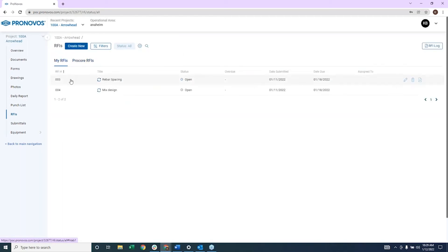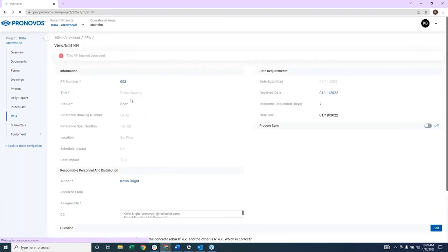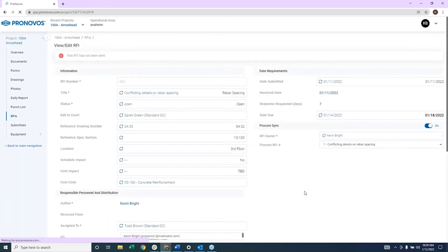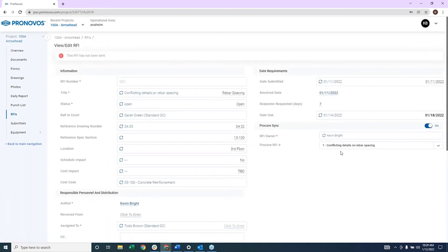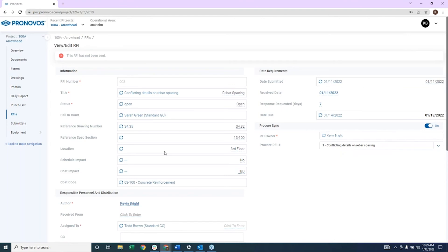And then in addition to that, what I'm able to do is if I go to a specific RFI, I can link a Procore RFI to a Pernovus RFI. So as the GC is updating any information related to the RFI within Procore, that information is automatically flowing into my Pernovus account.